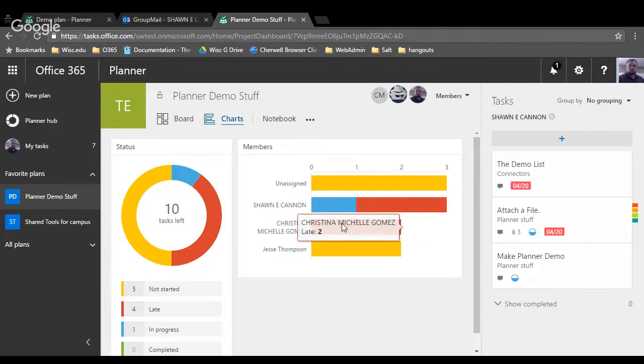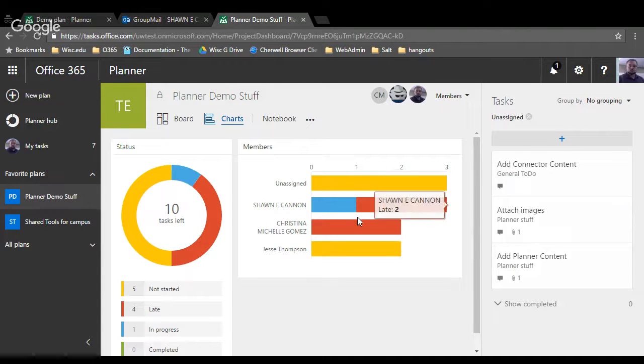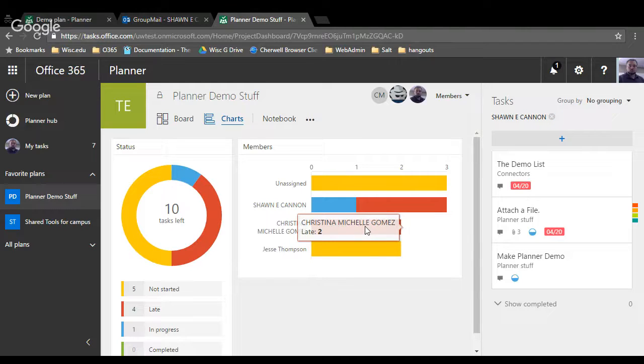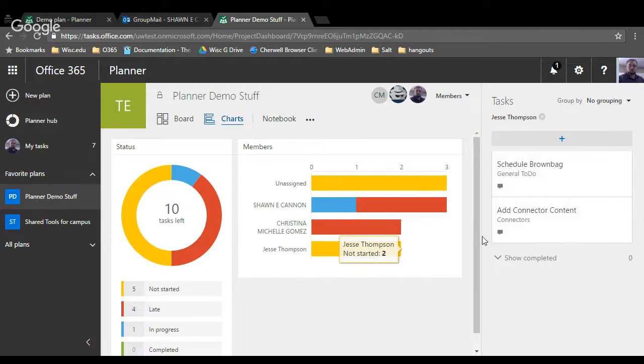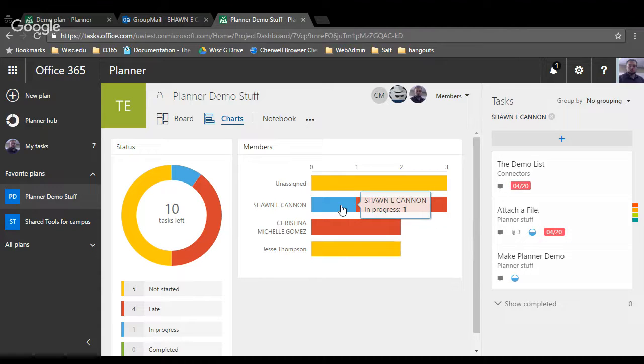Yeah, as you click on the various people's tasks here, the view changes on the side. It was up until I started talking about it. So I can see the most tasks that are assigned to me. You get a nice view if you are running the project. Maybe the division of labor is that one person has a whole bunch of stuff and somebody who's finished their task doesn't have anything assigned. It's a quick fix to drag stuff between people.